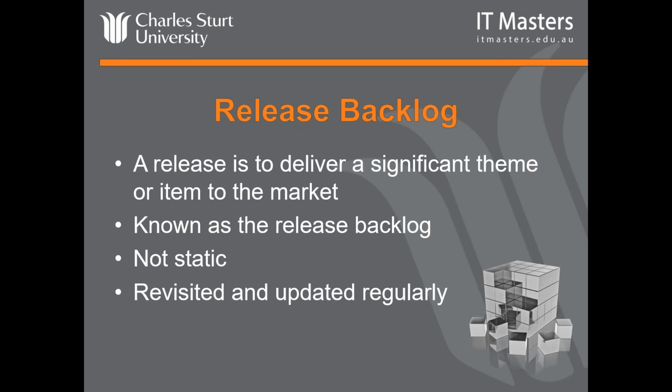And after identifying which stories would go into a particular release through the release planning process, the stories then become part of a release backlog, which the team will then estimate for the amount of time needed to complete each item. And like the product backlog, the release backlog is not static. It will change during the release when new knowledge is available and entries in the release backlog are changed or re-estimated. So again, it needs to be revisited and updated at regular intervals.